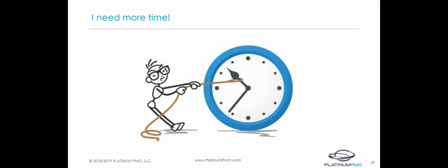We can also help mitigate this old adage by using the critical chain technique. Through the statistical modeling, we can estimate a percentage of the overall work to be part of the contingency buckets for those work packages that go over our initially estimated forecast. Remember, statistically speaking, 50% of the time things will get delivered under budget, and 50% of the time things will be delivered over budget. Use your buffer management technique to manage these ebbs and flows.